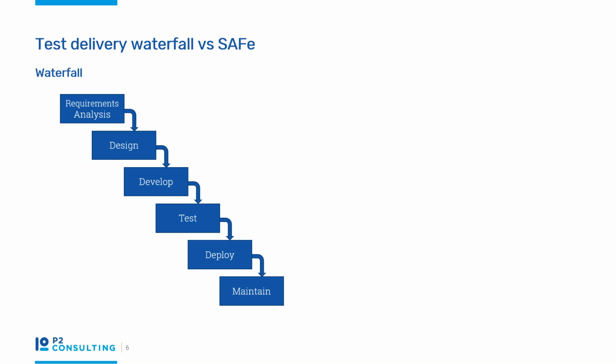And the third major challenge of this is probably, for me, the most interesting. It's a challenge around what I call the gap between the knowledge and the testing. What that essentially means is the development activity could have happened weeks, probably more like months, maybe even years on particularly large programs before the full-scale testing occurs. You then have a massive gap between the knowledge developed through that development activity and the testing. In worst case scenarios, you could have had that knowledge actually leave the business by then. So if you have a huge gap between the development and the testing, you have this huge knowledge gap that often makes it incredibly hard to remember and work out what's gone wrong, why you built stuff in the way you did in the first place, and so on.